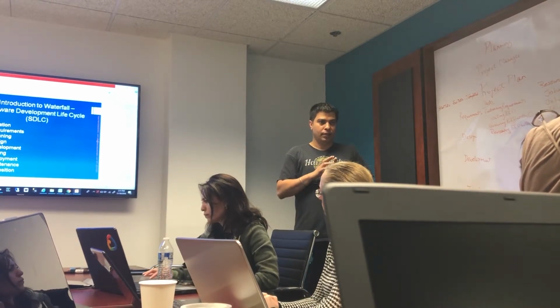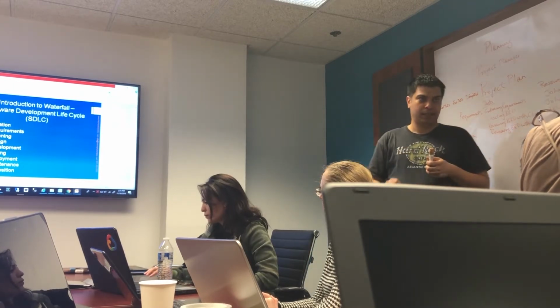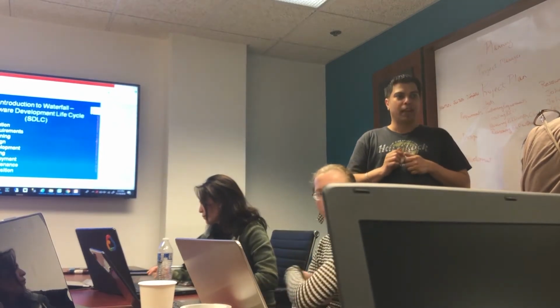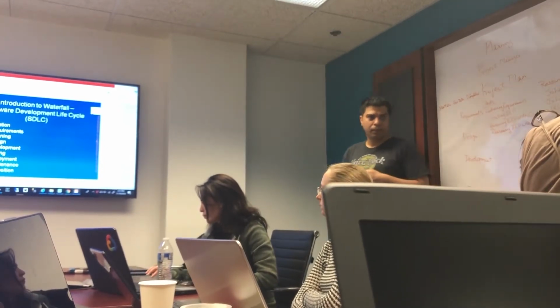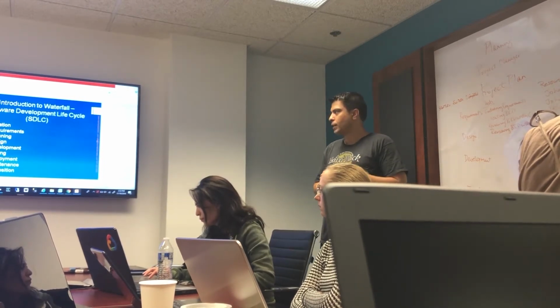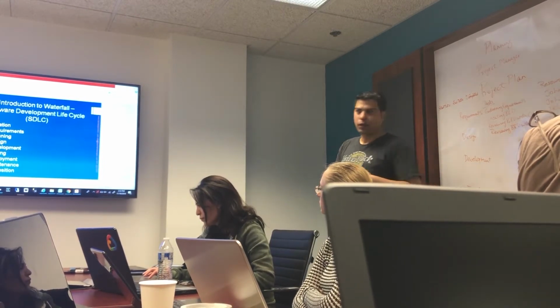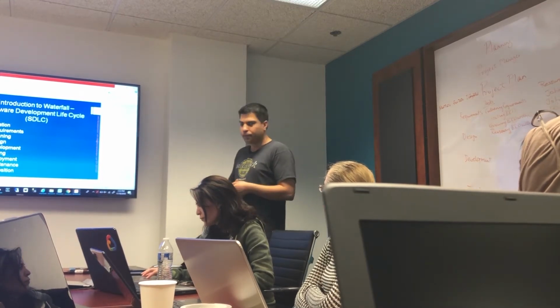And then the requirements phase, the BA tells everybody what needs to be done in minute details. First creates the BRD, sends it for review, and then reviews it with them. This line is the planning phase. You cannot plan without requirements. You cannot plan without the tasks. If you don't know what needs to be built, you can't plan. Okay?